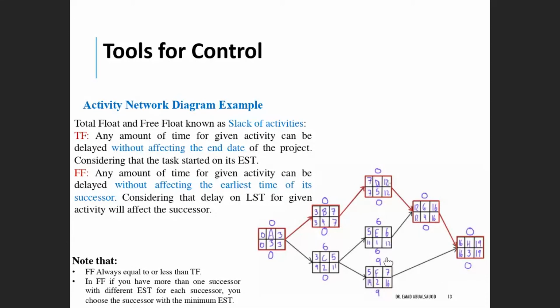Because here in our case, we have those 3 activities where we have room of time where we can delay some tasks. But in activities A, B, D, G, and H, we cannot delay those tasks, because they have to start on time, otherwise the project will not be completed on time.